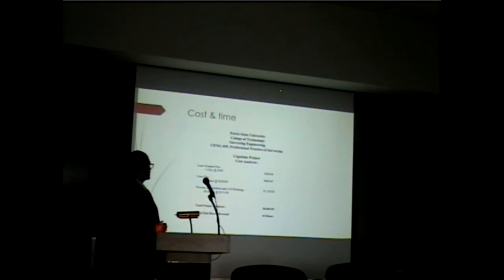So the total was $7,500. And the total project estimation is $8,600, and the total hours invested is 63 hours, including the 3 hours of field work and the 60 hours of processing.